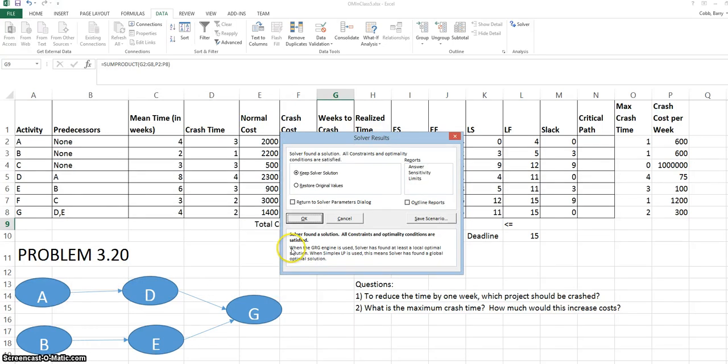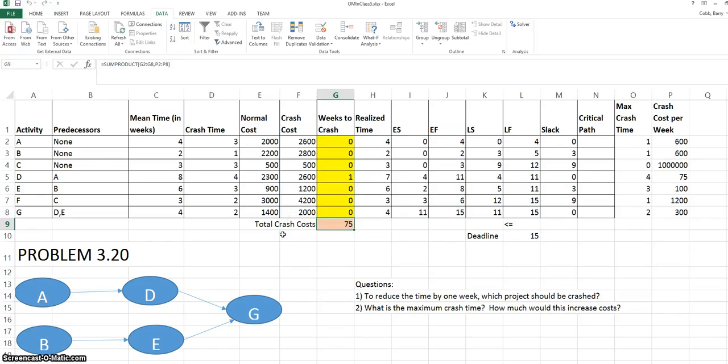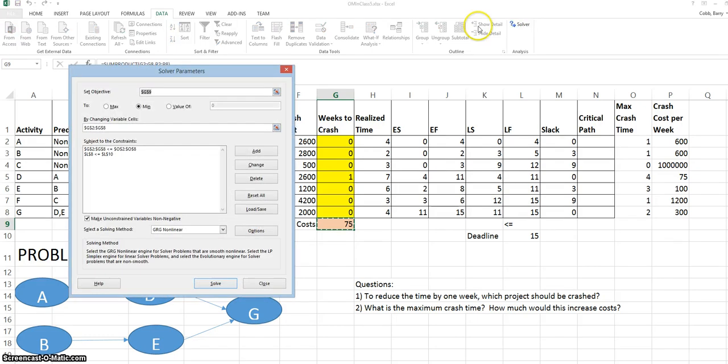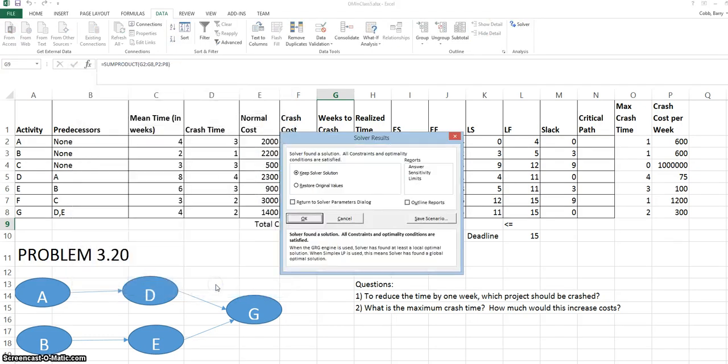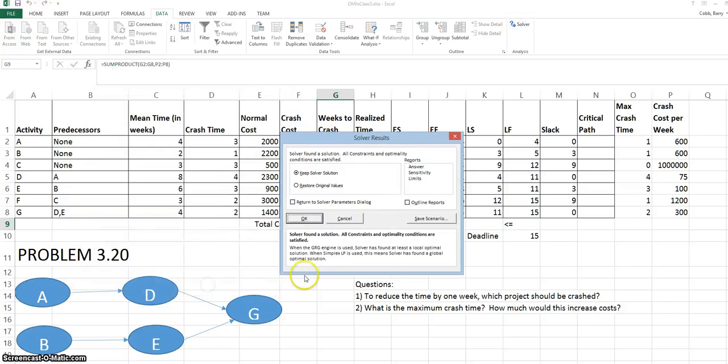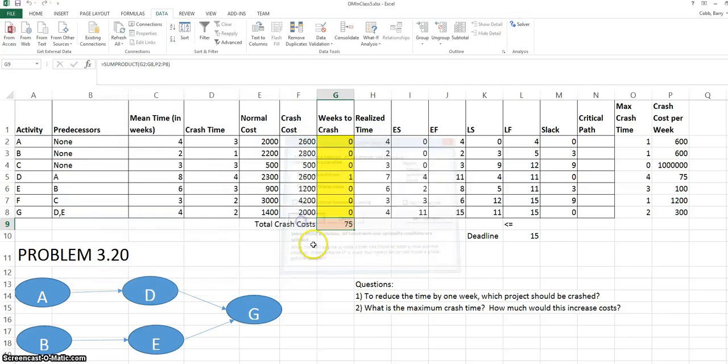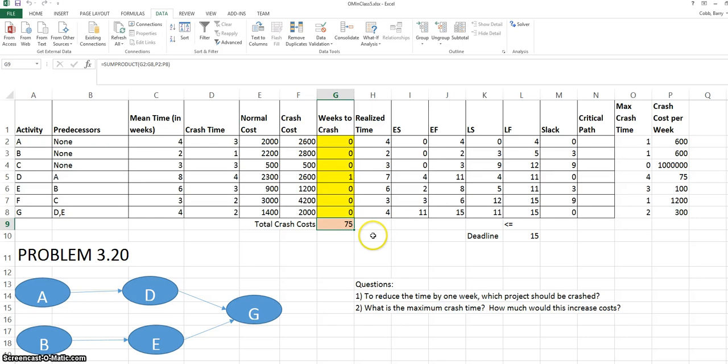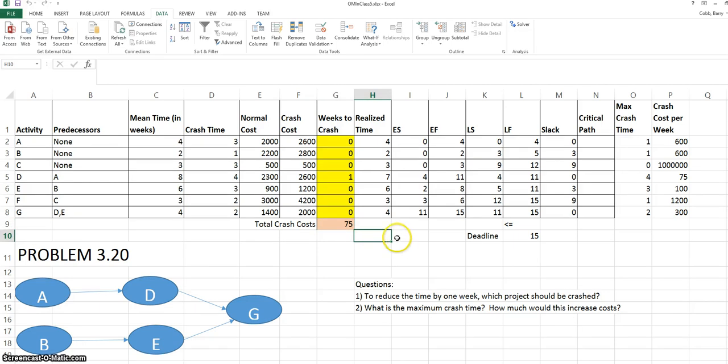We get a box that tells us that Solver has found the solution. For this particular type of problem, it's usually a good idea to open up Solver two to three more times and click Solve just to make sure that it has settled on the best solution. The algorithms that Solver uses are complicated and we want to make sure that we don't get stuck in any values that aren't the best ones. So now we see a solution that says crash activity D by one week at a cost of $75 and that will allow us to meet the deadline.